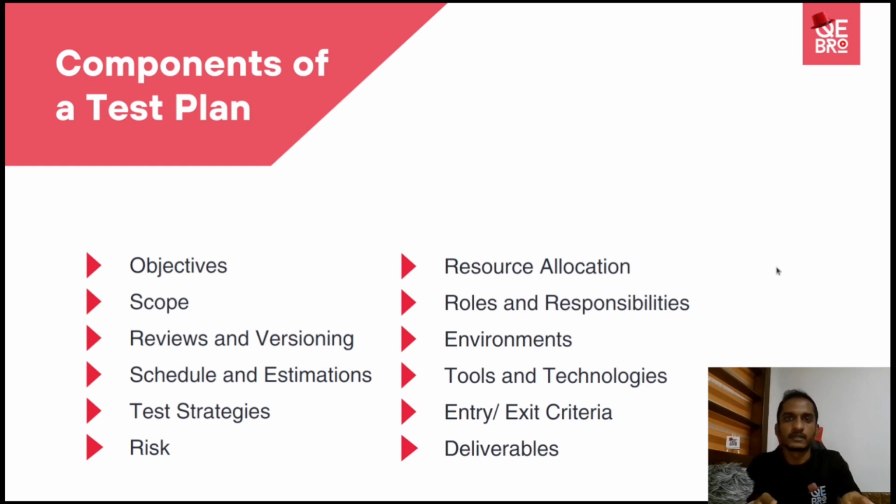So after testing, you can maybe include a UAT test document, which we will submit to the client, so then they will follow it and do the user acceptance testing. So no one needs to come and ask you to create the document, because now you know it was a deliverable from your side. You are the responsible person to provide it. So after doing the testing, you can start creating the UAT document. That is one example. Likewise, you need to mention the different deliverables in your test plan. So these are the main components of a test plan.